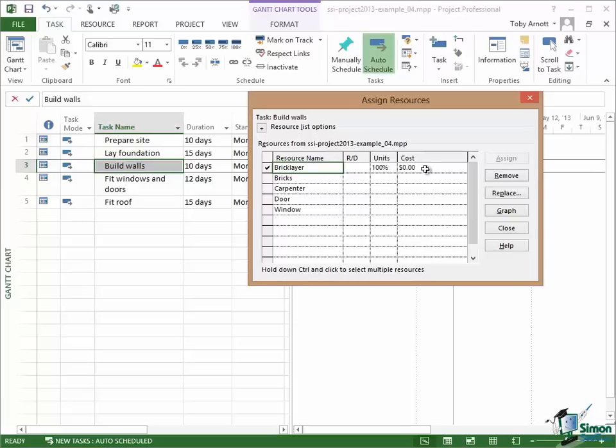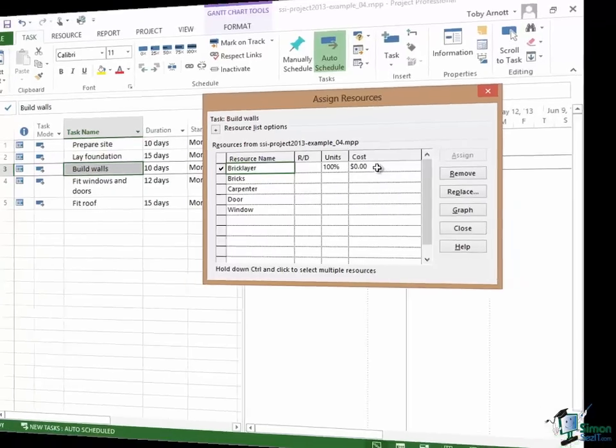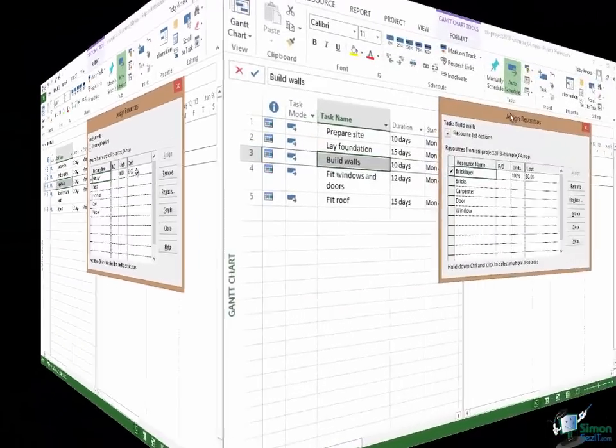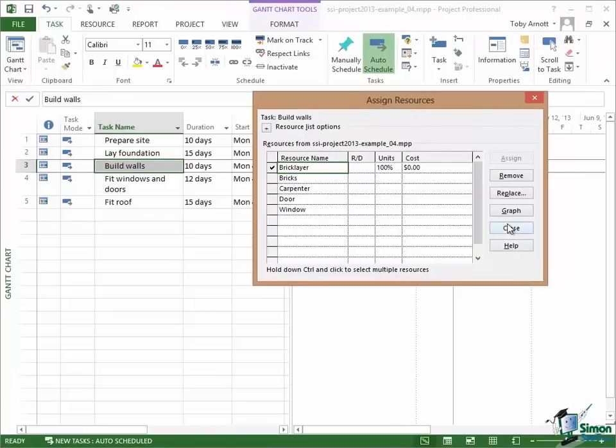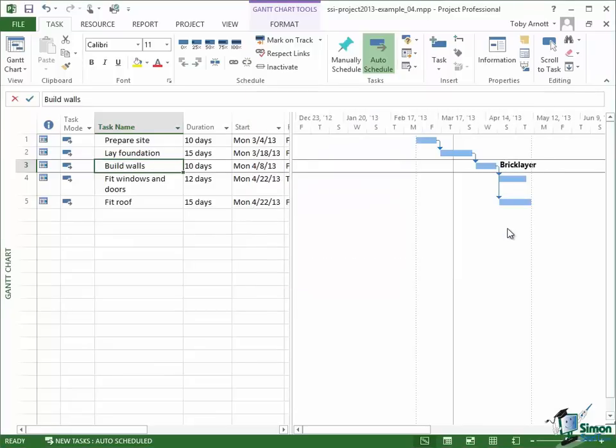Now at the moment, I haven't put any costs in. We're going to come back to costs later on. But if I had put a rate per hour and possibly even an additional cost per use, then the total cost of using the bricklayer on building those walls would be shown here. I could go through now and assign more resources to more tasks. The first thing I'm going to do though is to actually close this Assign Resources dialog and look at the impact of what I've just done on the Gantt chart.